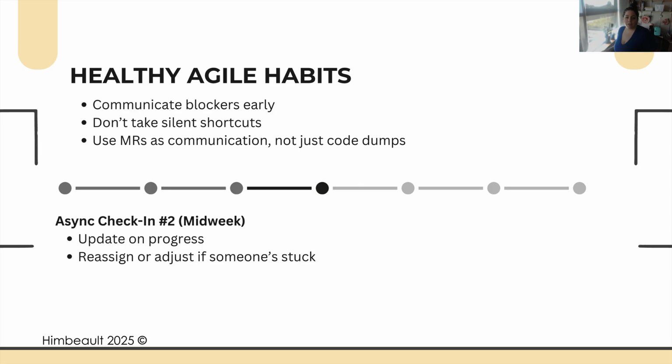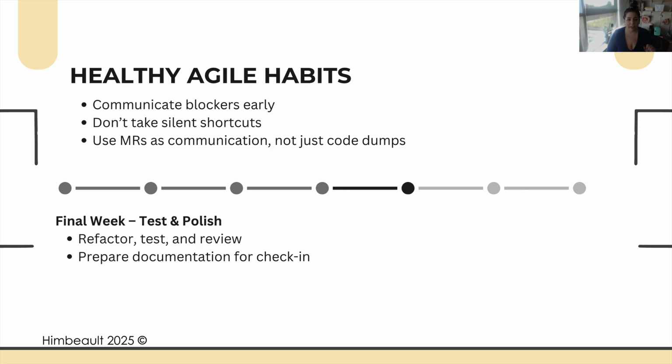As you're heading out of the midpoint, you're going to have another asynchronous check-in, right? Here's where we can have an update on our project. We can reassign work if somebody is stuck and not moving anywhere, or we can adjust and somebody else can tag team and help out on work if somebody is getting stuck.